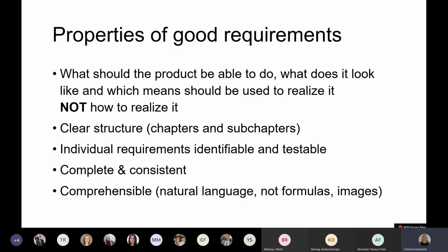It is important to note that the requirements are usually formulated in one big document with a clear structure and subchapters and subchapters. And in the traditional development process, this file is used to talk to the customer mainly and verify with the customer that we understand what they are trying to tell us. So oftentimes this document is the basis for a contract, so it is important that this document actually captures what we are supposed to do.